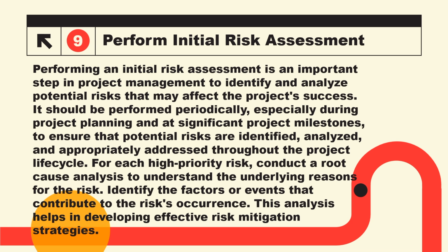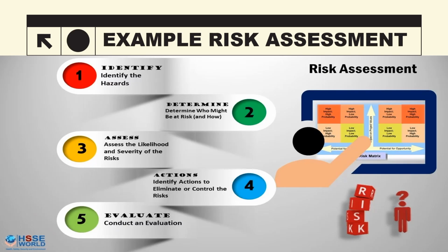Here's an example of risk assessment. First, we identify the hazards. Second, determine who might be at risk and how. 3, assess the likelihood and severity of the risks. 4, actions. Identify actions to eliminate or control the risks. And last but not least, conduct an evaluation.